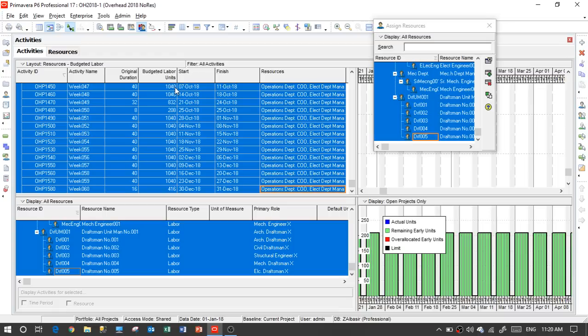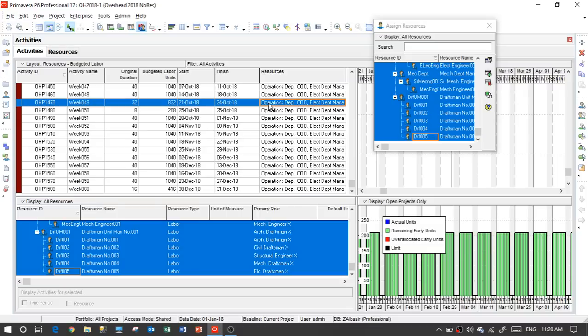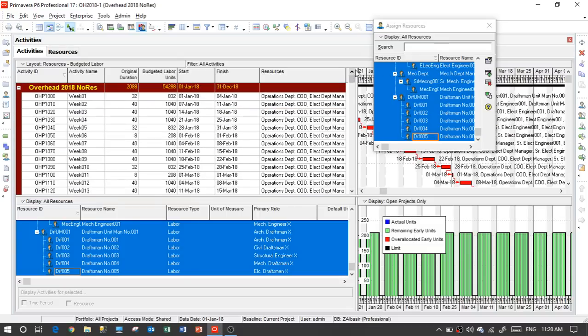If his cost for this 1 hour is 1,000, and I want to let him book only 15 minutes, then 1,000 divided by 4 is 250. Then I put his unit rate in our calculation background as 15 minutes. Okay, so 250 price unit. Now we have all the team booked in. Simple, very fast. It doesn't take us a long time.